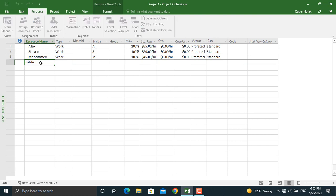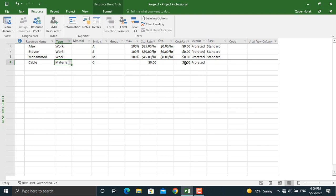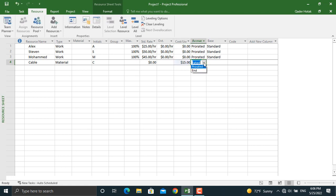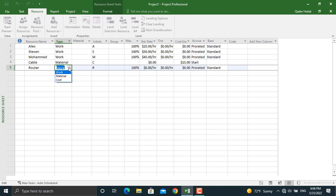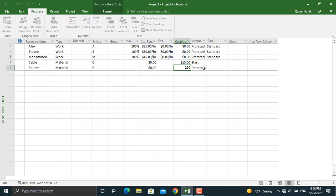Our next resource will be a material — for example, Cable. The type will be Material, and the unit cost for each single meter of cable will be $15. We will change the accrual to Start of each activity, because we usually buy materials before the activity begins. Let's assign one more resource: Router — also Material type — at $250 per router, paid at the start of the activity.